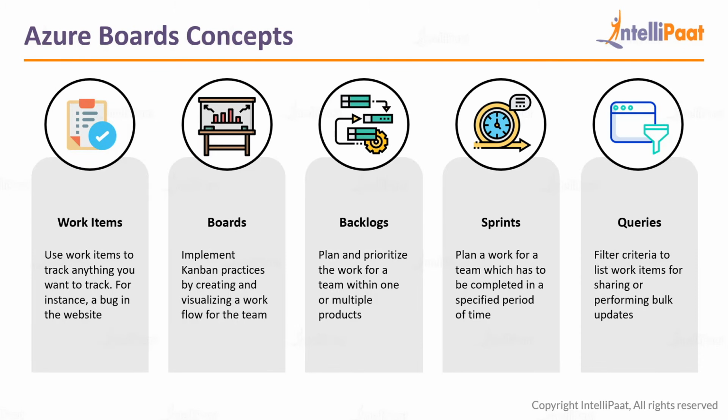It may be like doing, done, or issued before that. So first issued, then doing, then done. If you want to check whichever is in doing or active, you can provide the work item name as bug, and then you can provide doing. Once you give that and hit enter, there will be a button to filter. You click that, and you will get the entire query of which bugs are active right now.